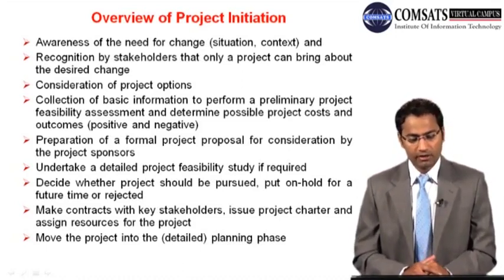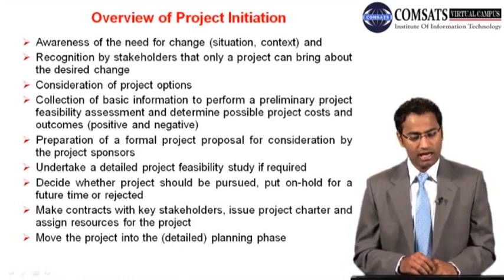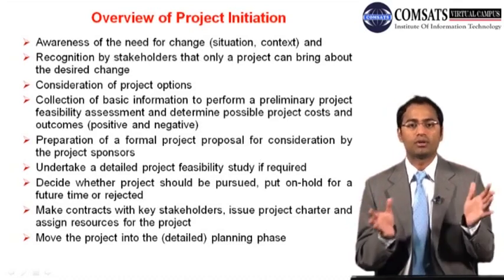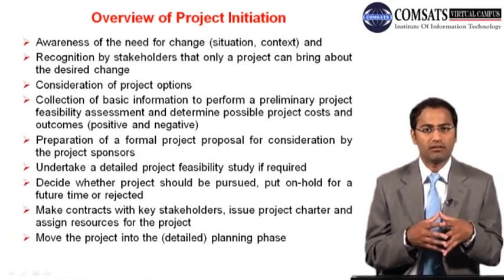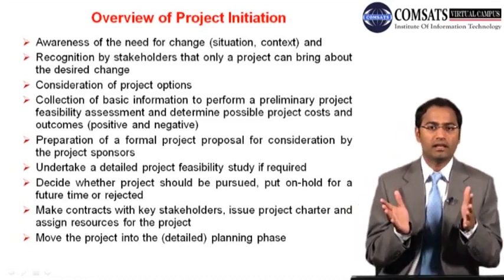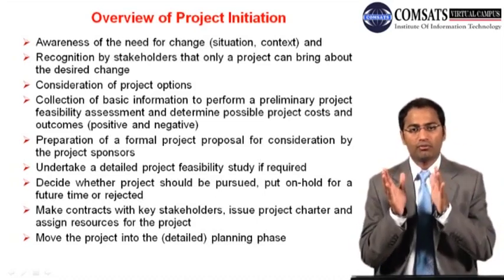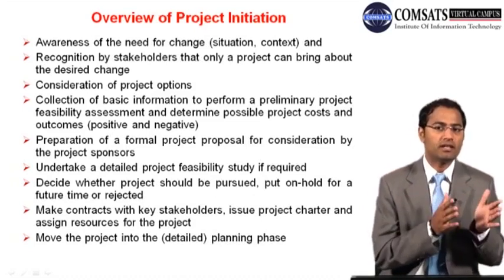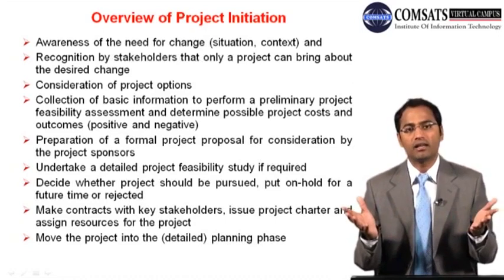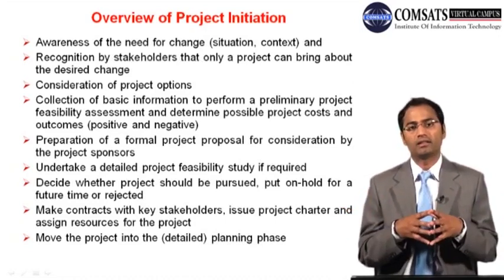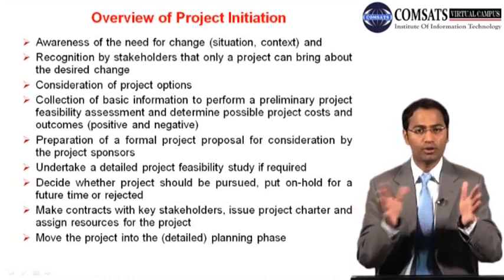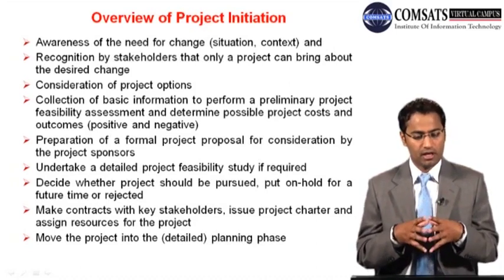And collection of basic information to perform a preliminary project feasibility assessment and determine possible project costs and outcomes. So you actually take up a feasibility study in initiation, to see whether your project is going to achieve your objectives or not. If you are going to erect a factory, a flour mill or a rice mill or something like that, and you are taking this as a project, your organization wants you to have a feasibility study, whether this new business will be profitable or not. So you are going to take some financial alternatives like benefit cost ratio, internal rate of return, net present value, payback period, and stuff like that. And we are going to talk about these in relevant sessions of this course.